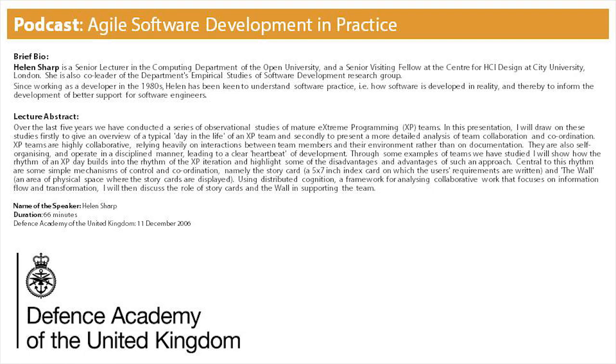Just for a minute, a bit more detail about the daily rhythm. So it starts the day, as I said: you go through stand-up, pairing conversations, and then it's the end of the day. At the start of the day, people just come in and do their own things. Then they go into something called stand-up, which is about 15 minutes. It shouldn't be more than 15 minutes, and it is literally a stand-up meeting. You don't sit down, you literally stand up. One of the reasons is that you can't stand for much more than 15 minutes without getting fidgety, so it's deliberately designed that way.